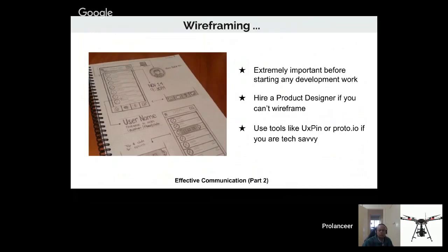Yeah, and wireframes are one of the best ways to share requirements with the developers. Yes. So they will be very clear what is required. So wireframing is going to help you to get the right budget and right timeline for your project, right? So it may be very simple for the development team to figure out how much time it's going to take to develop this project. Yeah. So before going to the development team or before outsourcing, make sure that you wireframe.